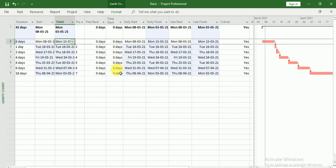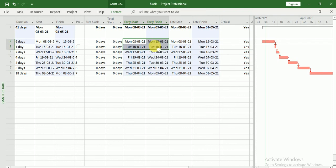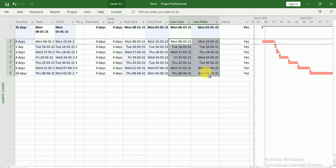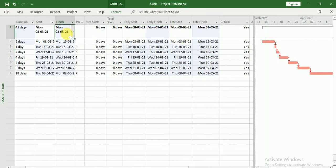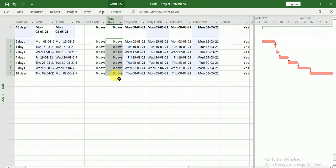So this covers Free Slack, Total Slack, Early Start, Early Finish, Late Start, and Late Finish. Early Start means the earliest date on which we can start that task. Late Start means how late we can start the task so that our project finish date should not be hampered — and that is related to Total Slack.